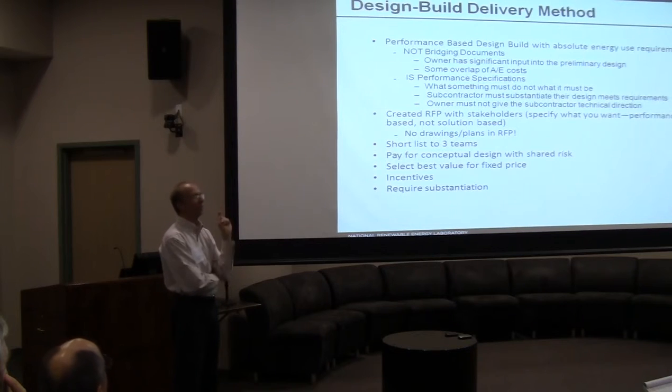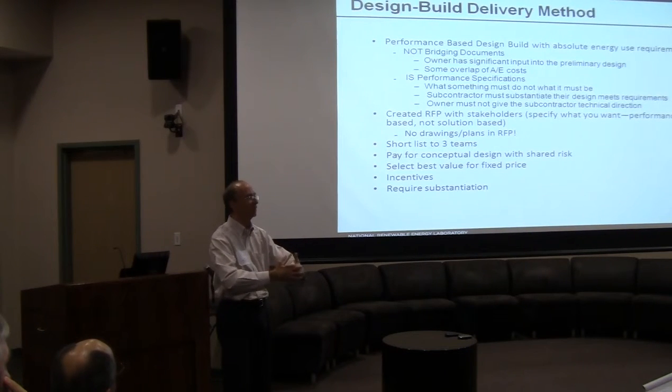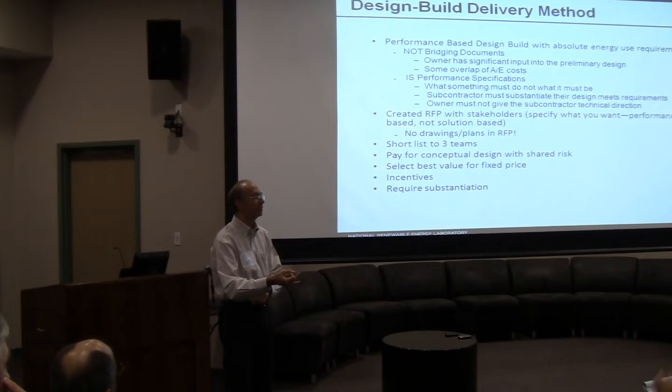But part of what this did was it unleashed the creativity of the design team, because they were kind of given some boundaries. They were given a sandbox, and you can do anything you want to in that sandbox. Don't exceed $64 million and meet the requirements of the RFP. You solve the problem. We were paying for professionals to come with solutions.